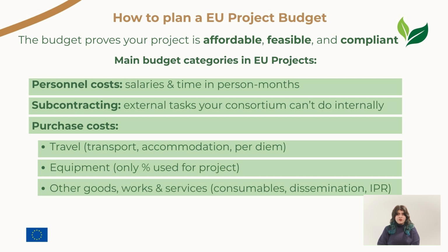Personnel costs are often the largest part of your budget. They cover salaries for the people working on the project, including employees, natural persons working under a direct contract, SME owners not receiving a salary, and volunteers. Depending on the type of personnel cost, they must be declared as actual, meaning costs are actually incurred by the beneficiary during the action duration, or as unit costs.